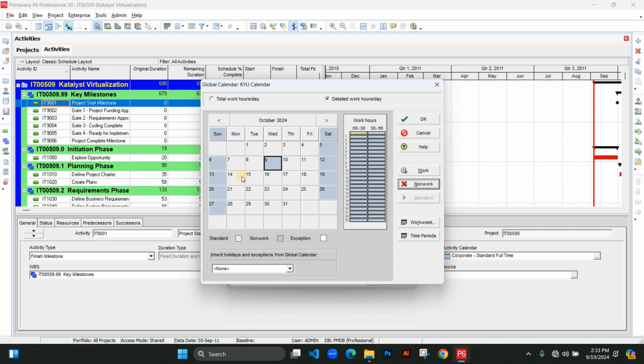But if you don't remove the public holiday, it's going to get done on 11. On 11th. You get it? So if you don't remove the public holiday, it's going to get done on 11th. So you put the public holiday and on 14th. So there will be a lot of changes related to the predecessors and all that. So if you forget to do this change, you will have wrong time estimates.